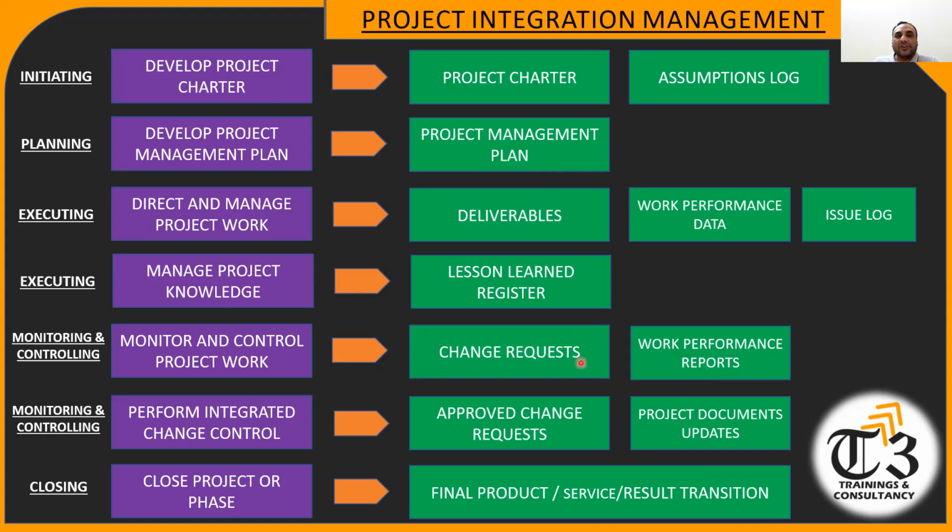The procedure of change request is the same. A change request is filed by the stakeholders. It will come to the project manager. The project manager is not the decision maker, but it is his job to evaluate the change request, the impact of the change request on project objectives, write down his recommendation whether to approve or reject the change, and submit this change request to the change control board.